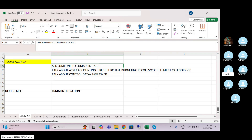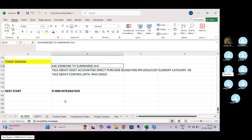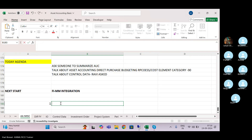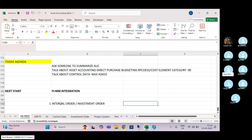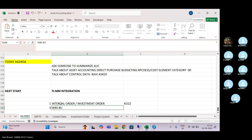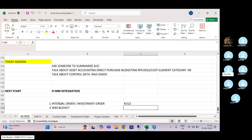Another point you might have noticed: I have also discussed budgetary control, because without budgetary control there is generally no asset purchase in the corporate client. So if you remember, internal order or investment order budget — you can load from CO22. WBS-related budget you can load in CJ30.